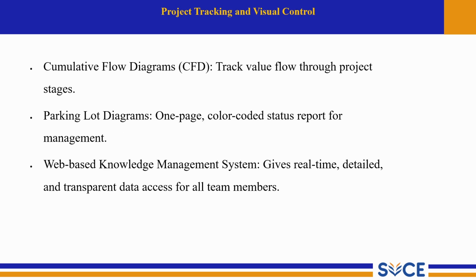Now let's explore another slide, that is project tracking and visual control. Here the cumulative flow diagrams track the value flow through project stages, that is, visually show how features move from design to build, helping spot bottlenecks and maintain smooth progress.